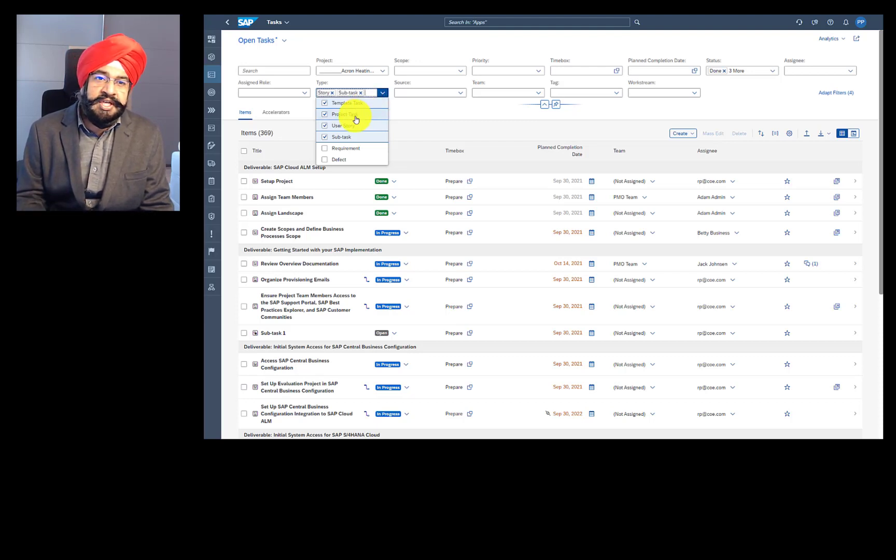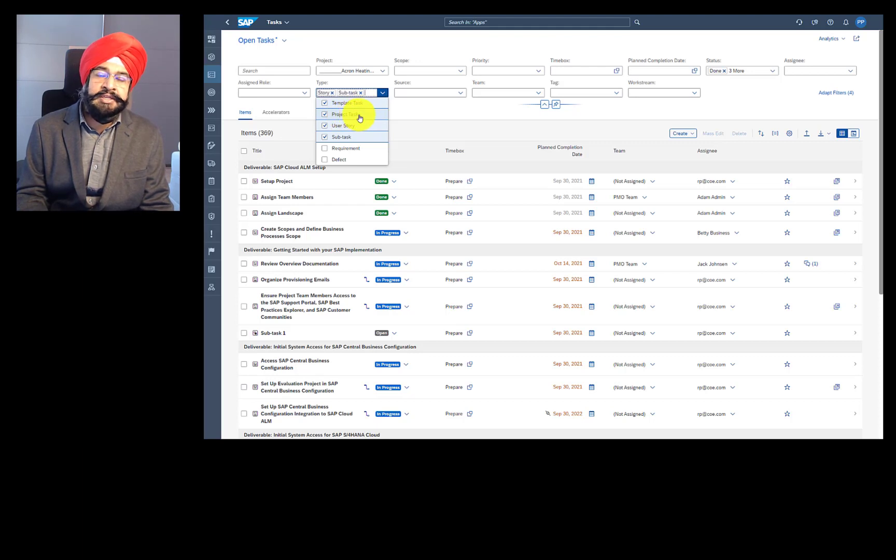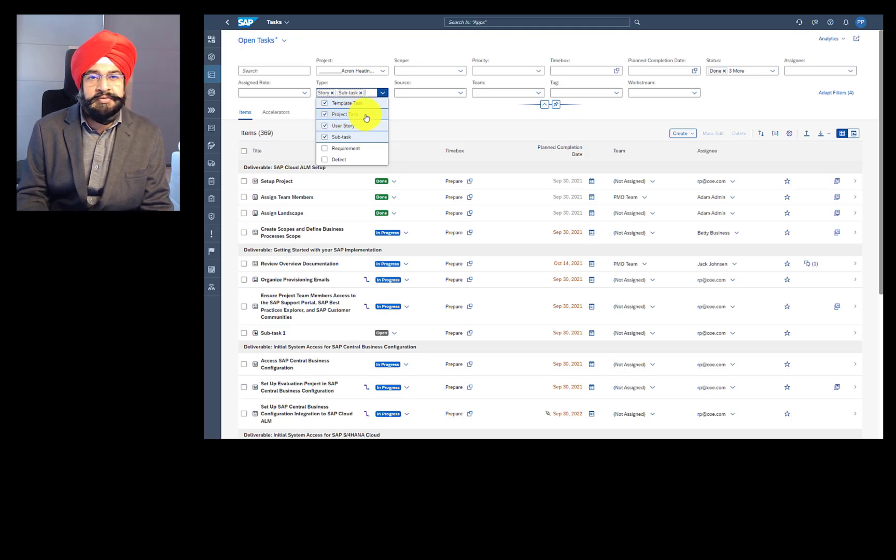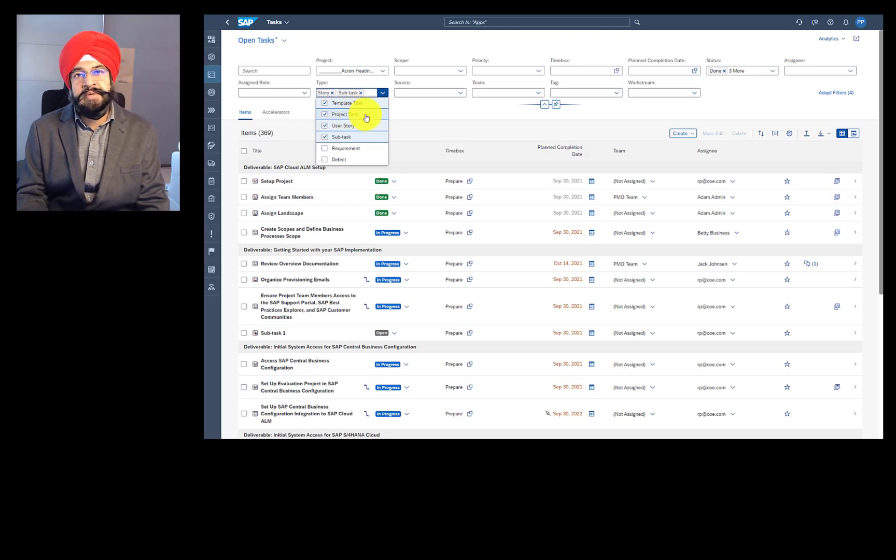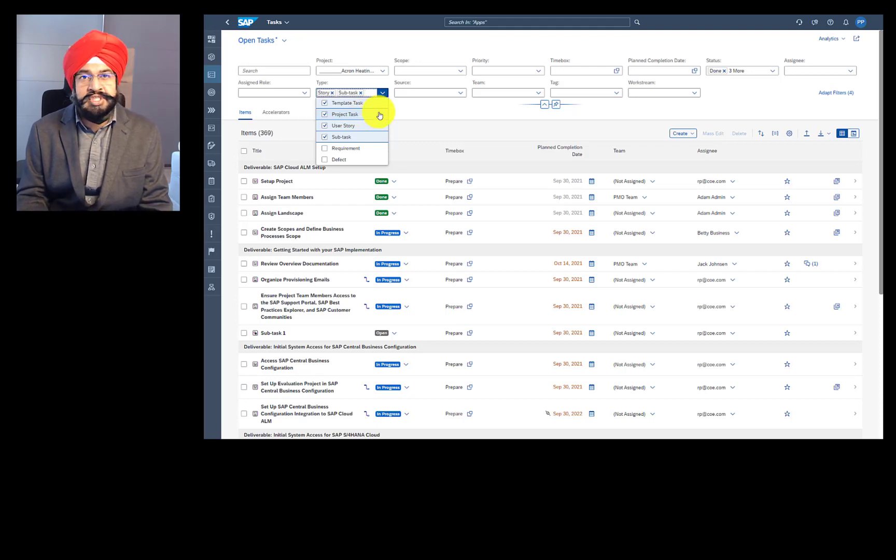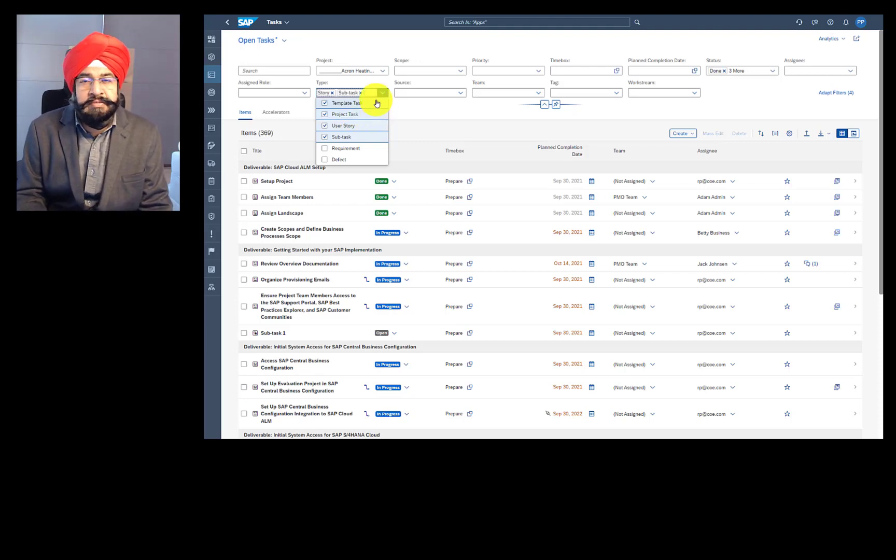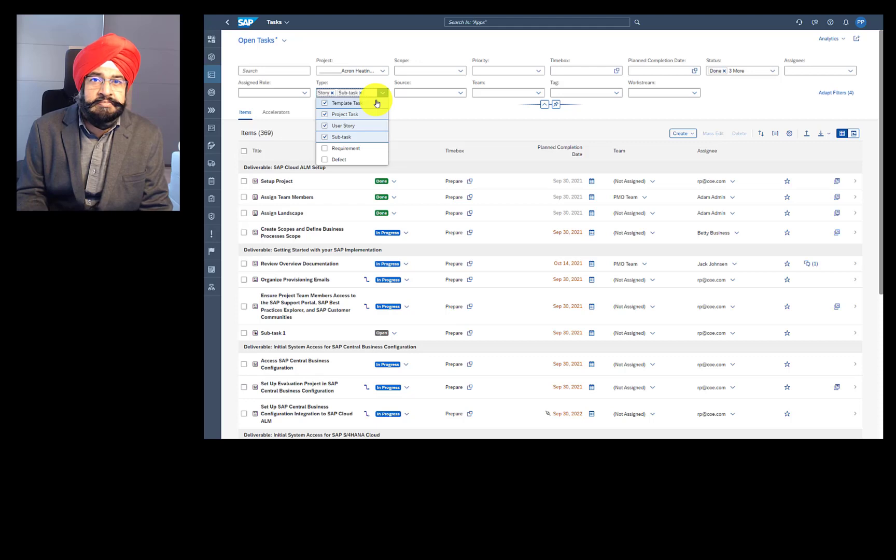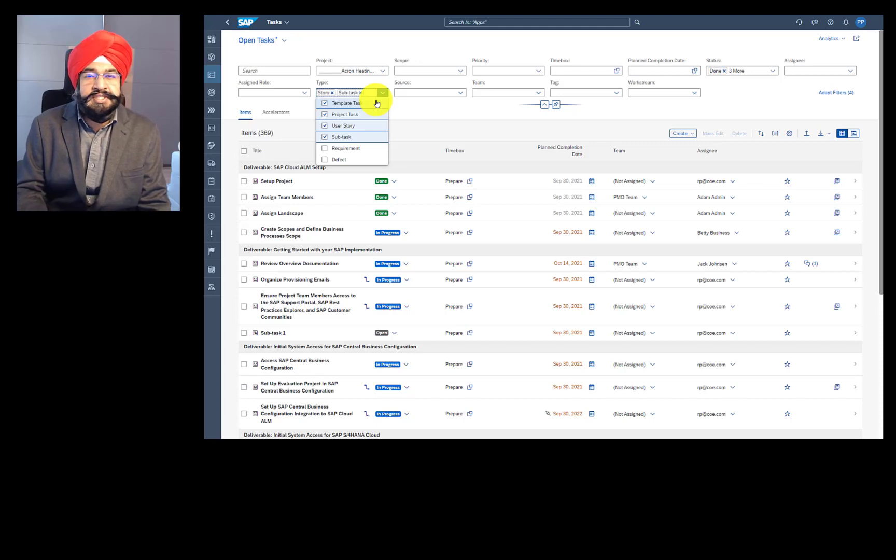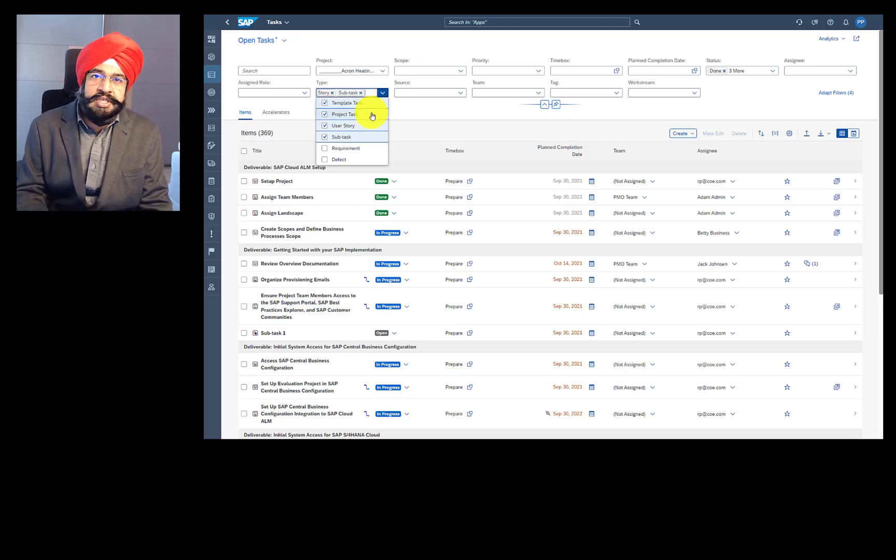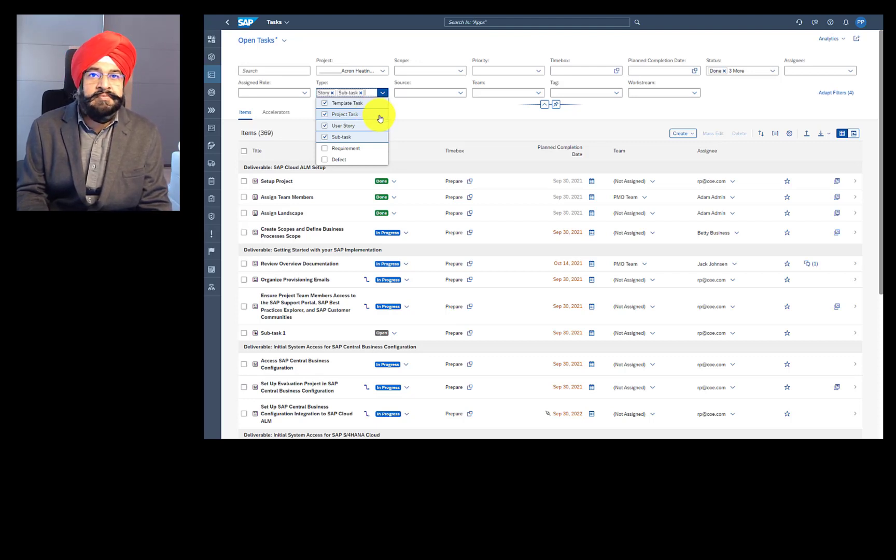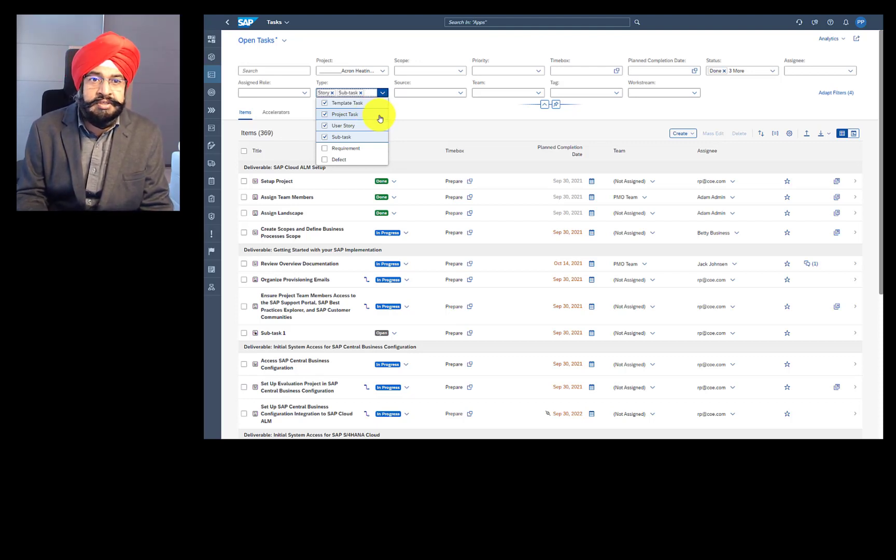The project task is the one which you create manually and here you can freely edit the description. Also, when it comes to dependencies, we do not allow you to change the relationships of those template tasks or roadmap tasks because that is coming from the roadmap itself. But for project tasks, you can freely change the dependencies or relationships because it's your own created content.